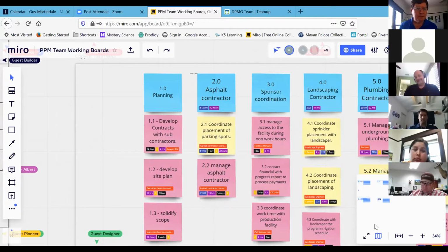I mean, okay, it's $200,000 or whatever the final is, but I would go, hey, what did you come up with for a plumbing contractor? And you can go down and say, okay, it's $6,400 and we have 32 hours and this is how it's broken out. And then now I have total confidence that you've given all the details on all of them, because I randomly picked that. And so it just builds confidence in the $200,000.